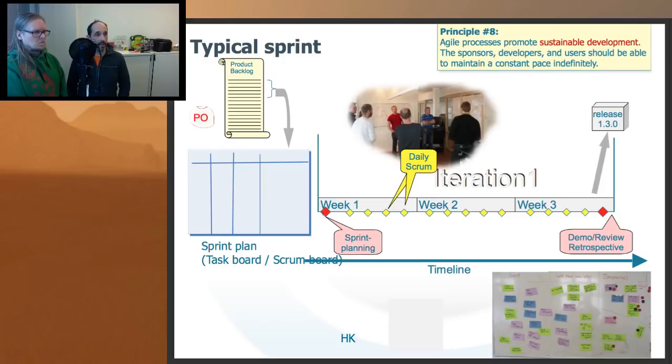And there are 2 things happening in there. First is the product backlog prioritization. With the customer, the team discusses the features, what should be taken in the next iteration. So it's prioritization, discussing, making sure that the team understands what these features mean. Because we don't have any excessive requirements documents, we have just simple user stories which can be 1 or 2 lines for a feature.